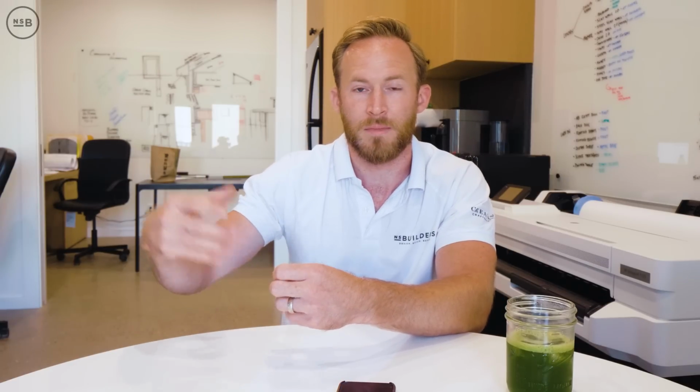So it's really hourly dependent. So we're looking at how many hours we think we're going to spend on that, and then setting a fee. So for instance, let's use the $10,000 for an example. Let's call that $100 per hour. We're figuring 100 hours at $100 an hour puts you at $10,000. And we're thinking that, hey, that's going to give us enough time to put all this stuff together. If we think it's going to be more than that, we might bump that up.